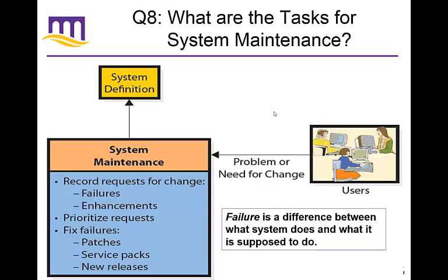And sometimes when you're developing a system, especially as you're running out of time and nearing the end of your project plan and some things aren't finished, you just say, well, fine, we're going to prioritize which things need to get done. And if some things don't get done, we'll do it in a later implementation or a new version of this piece of software. And that's why you see software with 1.3.5 as the version of the system, because they do that all the time.